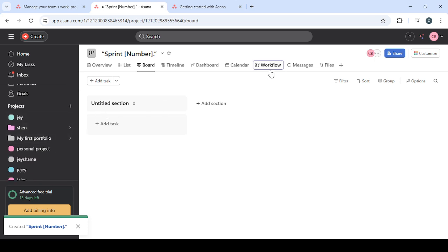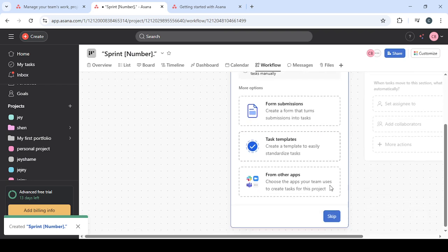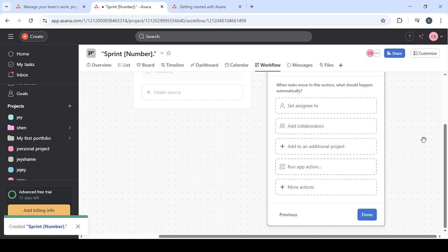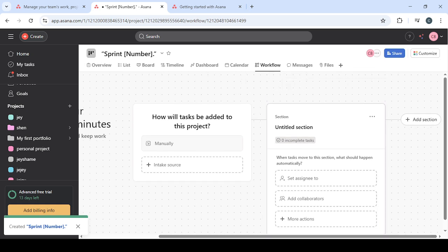Move only the selected items into to-do so your sprint reflects a realistic shared commitment. Assign tasks to their owners and set due dates that fall within the sprint duration. If your sprint runs 2 weeks, make sure the dates don't spill beyond that end. Start dates can help sequence work when timing matters, but the most important part is that every task aligns to the sprint window. This keeps priorities visible and helps you spot risk early.